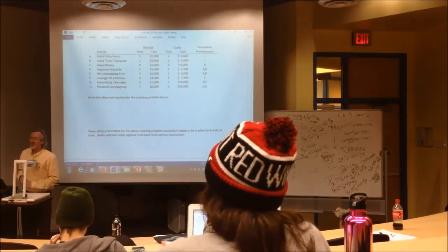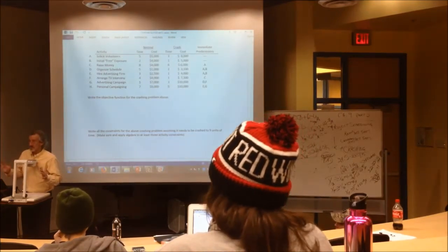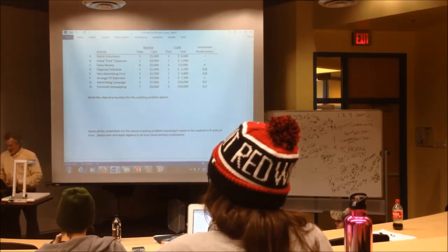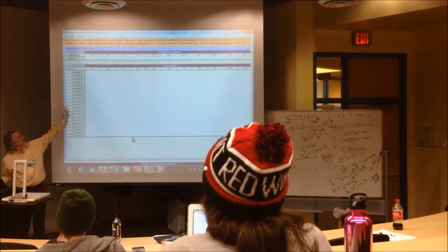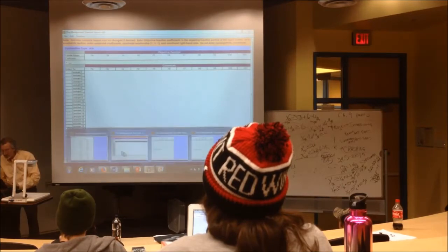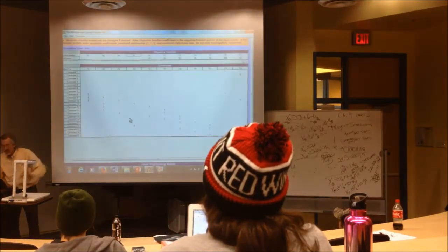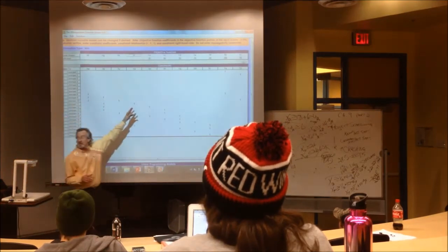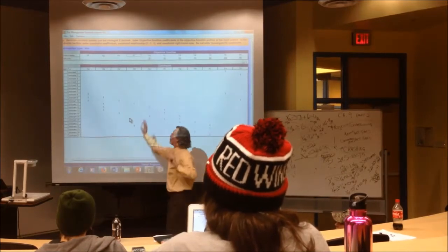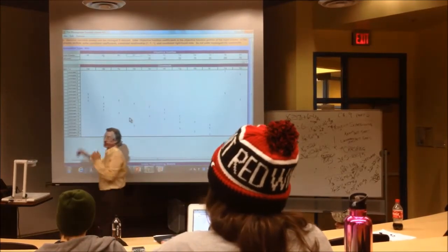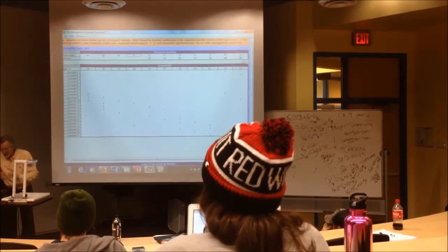When we were writing the objective function earlier, you told us you only do the Y's. On the program, you have the X's and the zeros. No. You have all the variables in the program, but you only write numbers underneath the Y's. Edit. See how there's no numbers under the X's? But they're all on the Y's, because only the Y's are going to be the objective function. You have to have every variable listed. That's why you see all the other ones there. Exactly. All right?